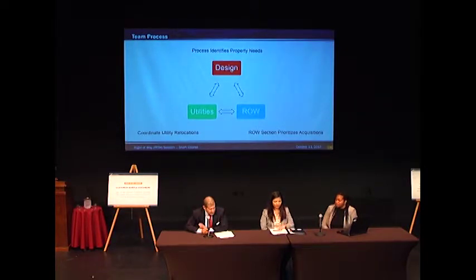So it begins with a team process. And actually, when I wrote that, I think that's a misnomer. Every project will begin with a problem. You have a problem with congestion or whatever it is, and then it becomes a project, then you get into design. At that stage, the project goes through planning, schematic, project specifications and estimate, PS&E, all the way to letting.